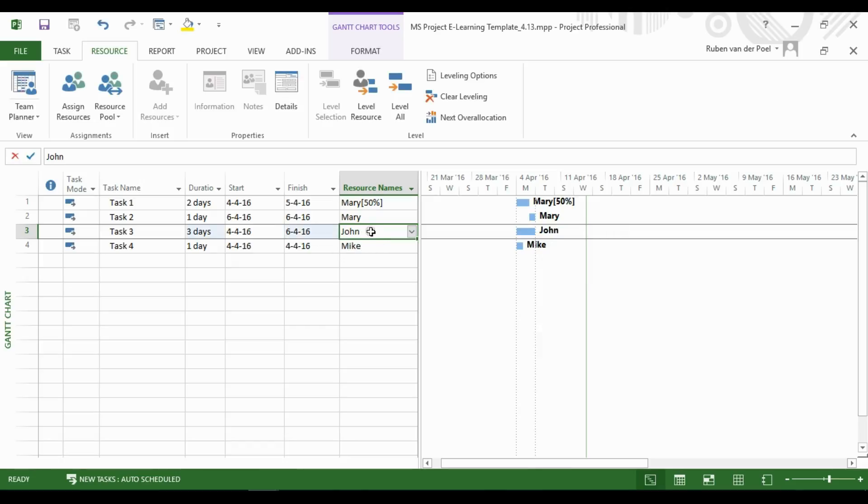You see that this has created a new assignment, and any specific assignment percentage or pattern is now gone.